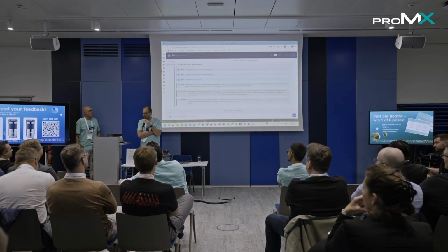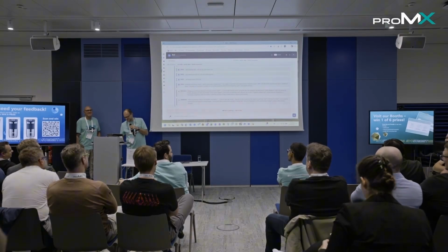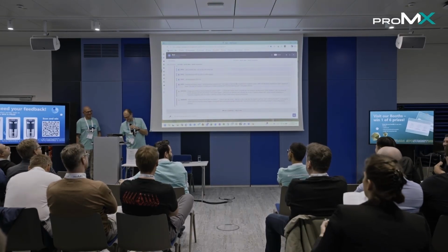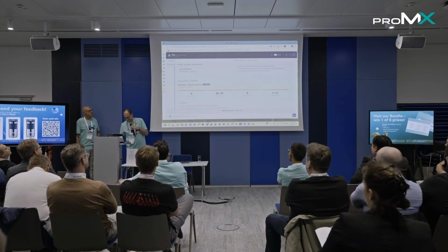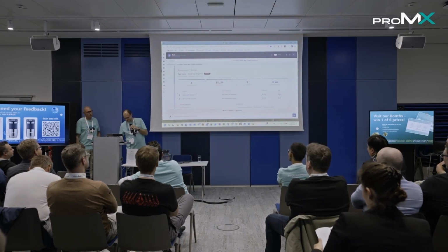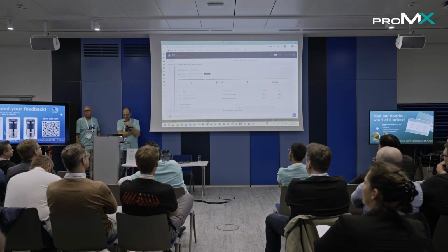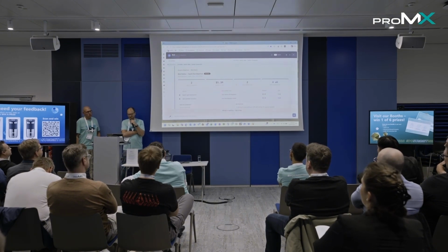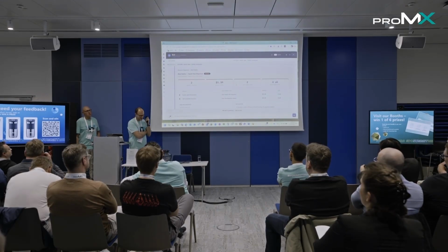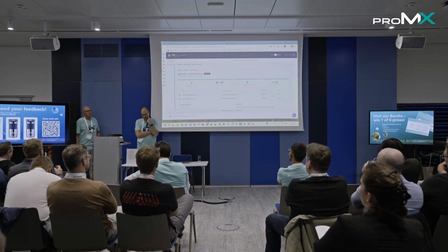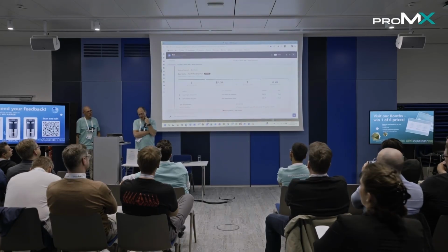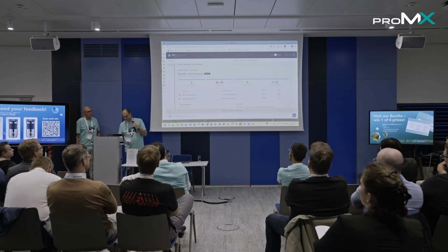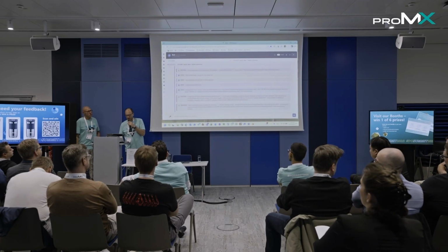Sarah Chen resigns with 2 weeks' notice. This will be a critical portfolio disruption affecting 2 major transformation programs with a combined $5.3 million budget. She is the sole owner of 2 critical path streams, and without mitigation, each project could slip by approximately 4 weeks, with high risk of further cost and performance deterioration. There is no ready replacement with available capacity, and her current 135% utilization.